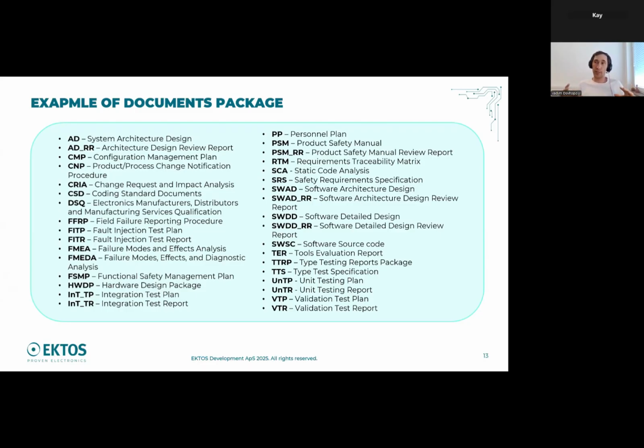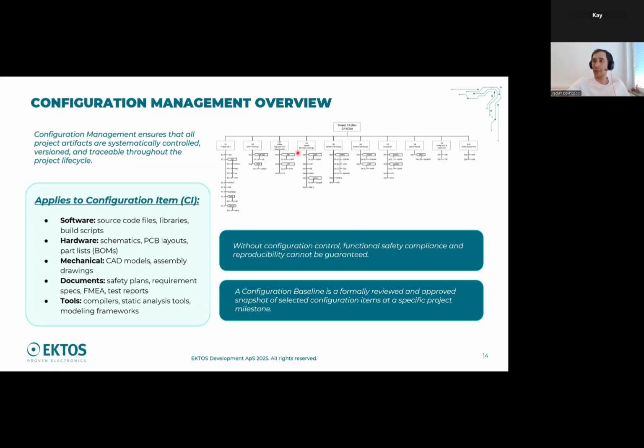Okay, and now the functional safety management plan is finished. Just to remind you, it is inputs, a list of activities or action activities, and outputs of each activity. If we collect all the outputs, we can create a list of items or documents we have to produce. And here we have to consider how to store this data, how to structure it, how to make the structure for this data.